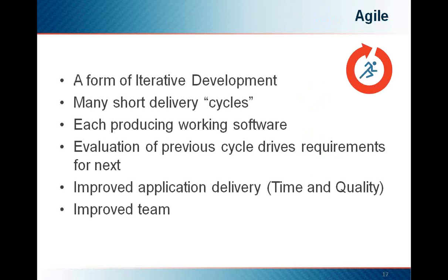That makes sense. Well, it sounds like you needed to have a little bit more agility, or being agile. That's right. Now, most of you have already heard a lot of buzz about Agile. I'm not going to give you a history lesson here. It's more important to understand that Agile is a form of iterative development. Iterative delivery means that the requirements, design, development, and testing are all completed through many cycles, each relying on the feedback from the previous cycle to provide the requirements for the next. So it sounds like this way potential development issues can be dealt with when they occur.